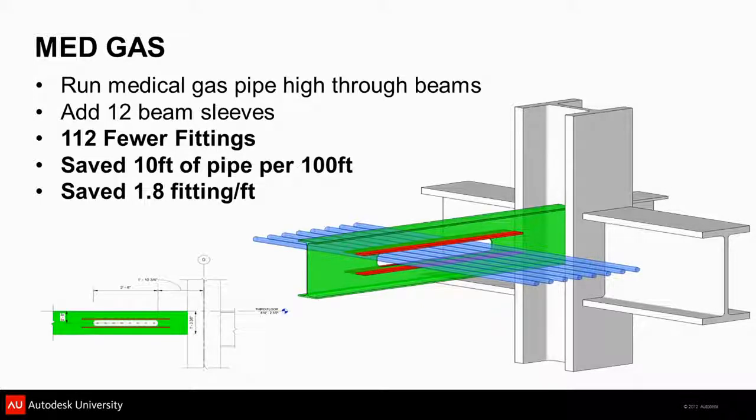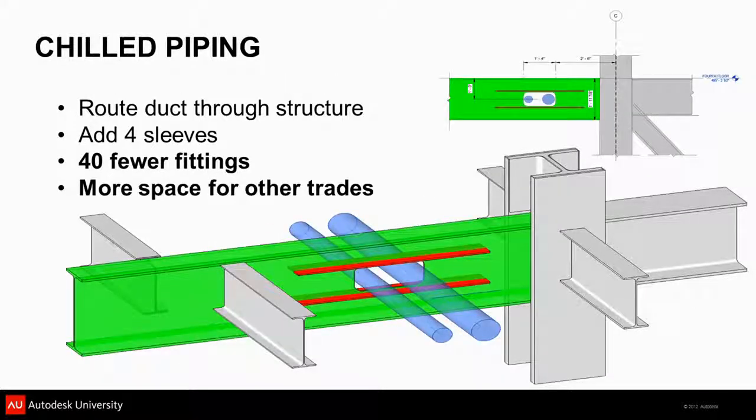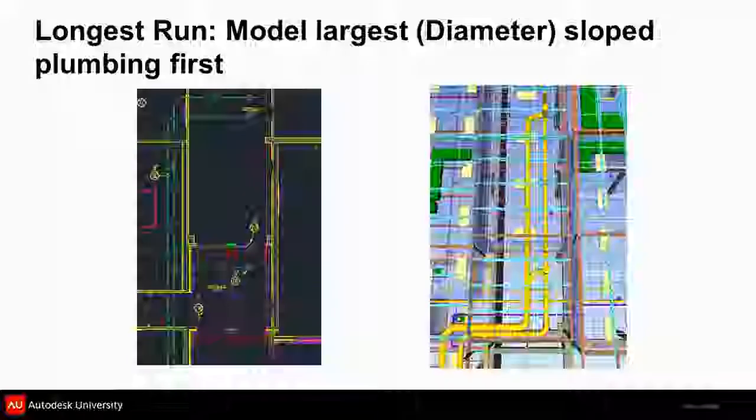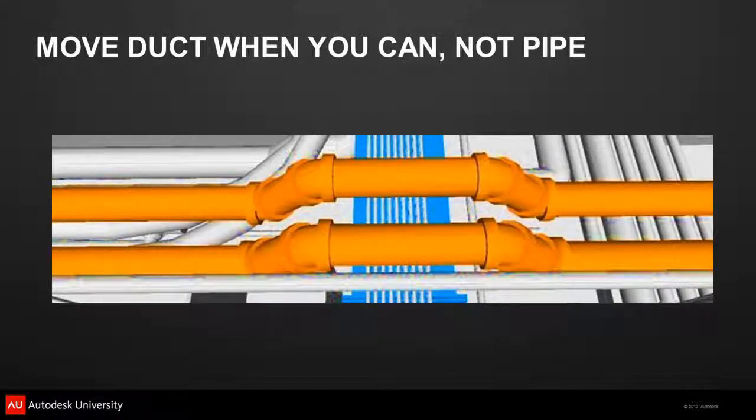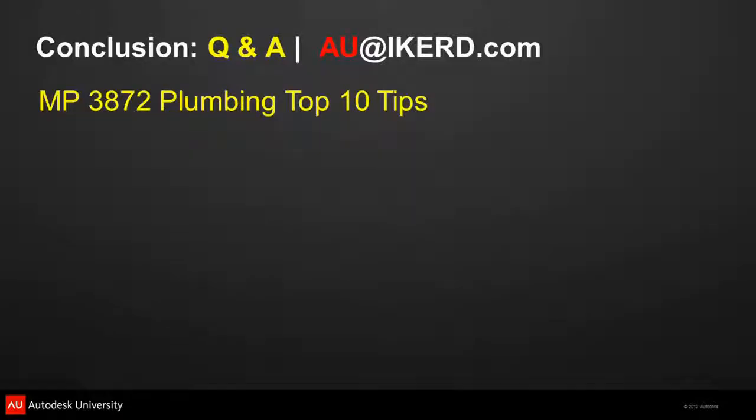It's not every application. I'm not saying this is every solution for every problem. It is something good to know. It can be done. It's not that hard. And you want to just be logical. If you can pick one system down a congested corridor, move it up into structure, and clean the corridor, and you're only doing a handful of openings, I would throw it on the table. It's a viable option. We talked about long runs. We talked about the fittings. That got into a good discussion.